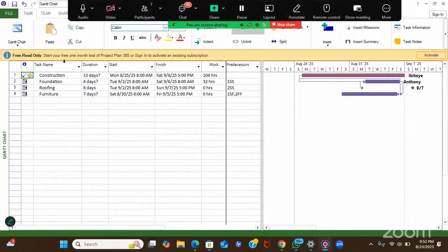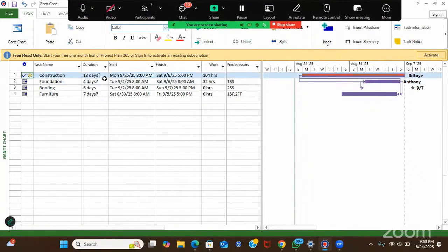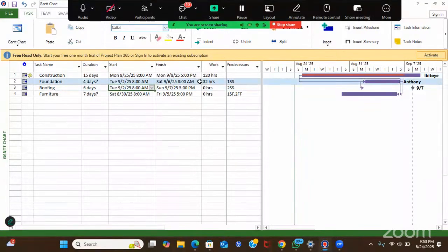It's a good question. The duration automatically updates itself from the start date to this day. It counts the number of days and gives you the duration. If you are planning for a 2 month duration, you just input it on this duration. And if I increase it to 15 days, automatically it changes my date.